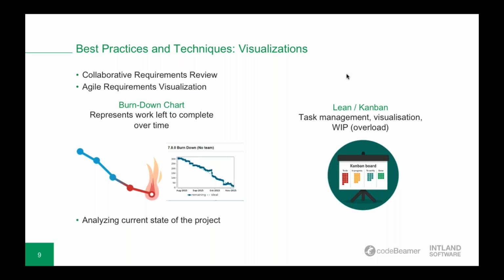All tasks can be monitored, measured, and reported by following the Kanban view and checking to do, in progress, and verifying completed tasks. The Kanban board also provides a quick overview of the balance between the expended resources and work in progress limits. Enhanced flow is ensured. When something is finished, the next highest thing from the backlog can be pulled in to take its place.